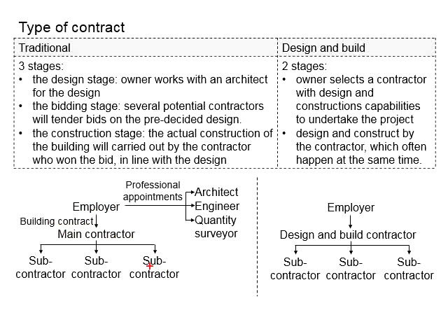In the case any of the subcontractors cannot perform, it will be the responsibility of the main contractor. Any problem between the subcontractors and the main contractor will have to be resolved between the two contractors.